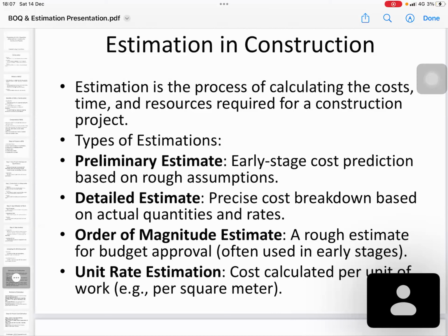To get the cabinet approval, we did a rough estimate. We got the details from earlier projects: what is the cost to do that, what are the additions and omissions. We had some money on that and we got the cabinet approval.